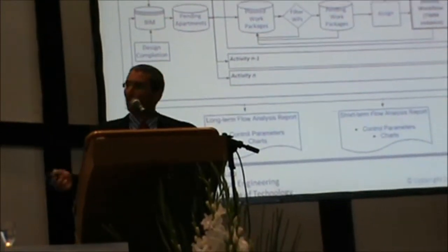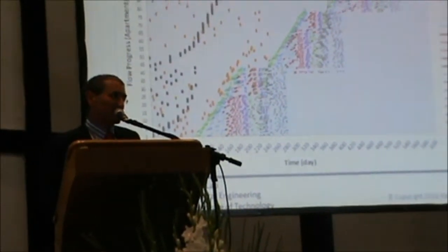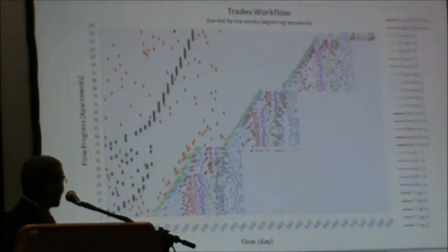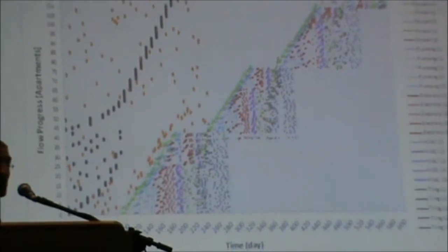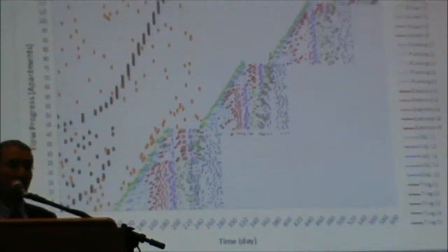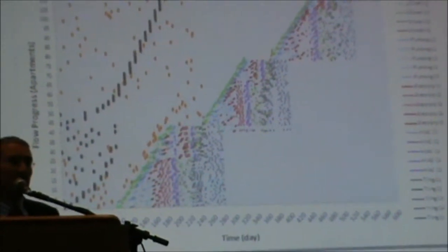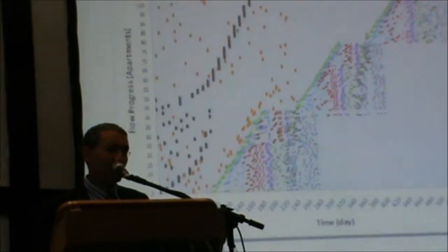The details are not important, but the interesting thing is how effective a tool this can be, because what we find, as I tried to describe to you before, is that here you see a drywall team working up, and as soon as they can go back down, they do go back down, and then the other teams have a break in their work. During this time, say from here to here, they're without work. They leave the site, they come back. It becomes chaotic rather than controlled.